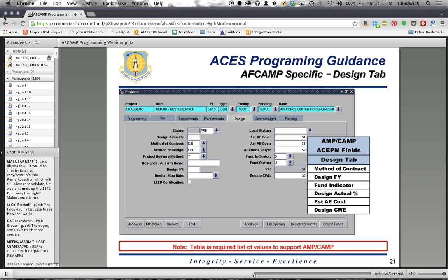We're going to do a pull on March 1st, and any requirement that has an MDI over 80 and a probability of failure greater than 80 will be on the list to receive design funds. That doesn't mean that we won't go lower than that, but that's going to be where we start.